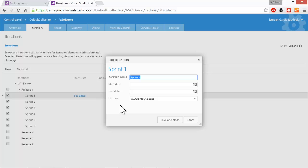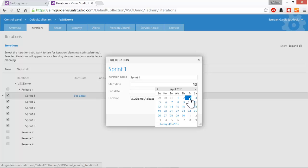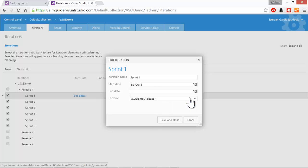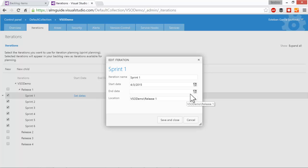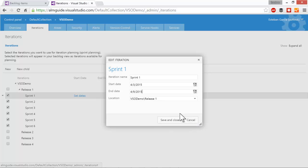Here I can change the iteration name. I can also set the start date and end date of my sprint. If I select the calendar, it shows me the dates that we have going on right now. And let's say that today is going to be our first day of the sprint. I'm going to run Friday through Thursday on one week sprints. So then I'm going to select the end date as April 9th. And then click Save and Close.